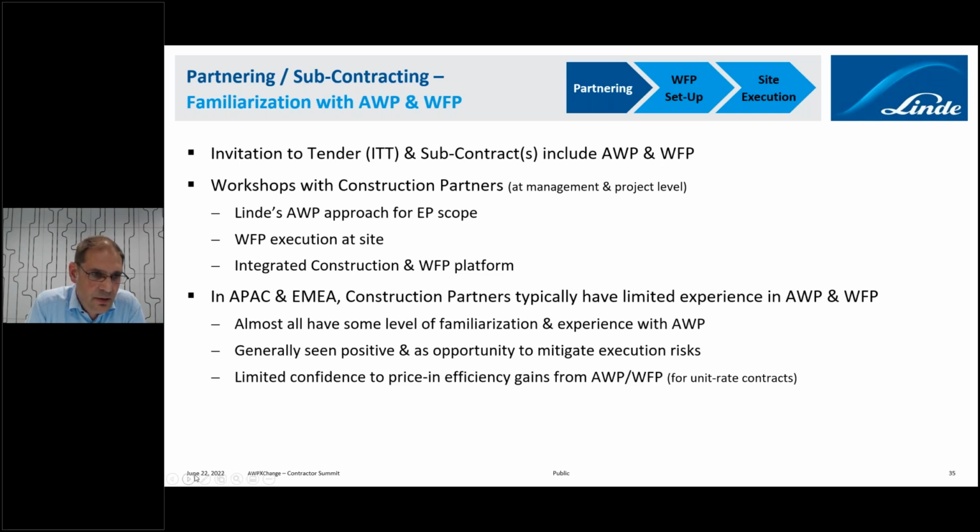We conduct now workshops with all construction or potential construction partners. Here it has really proven very important that these workshops are joined by the management level from our construction partners as well as the project level, because at the end, if they are not aligned, we will not be successful.